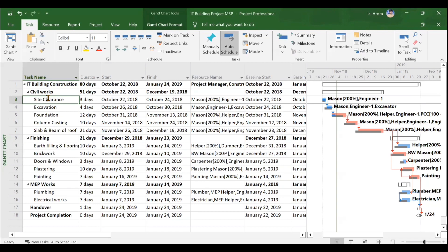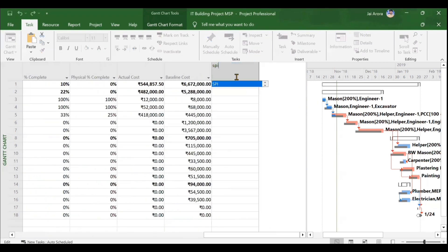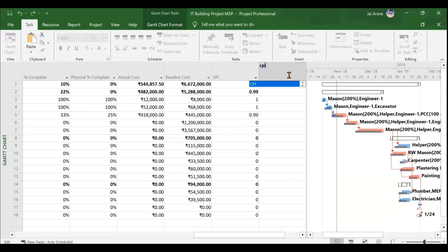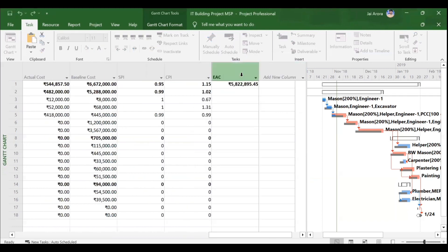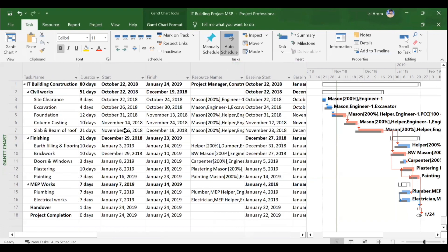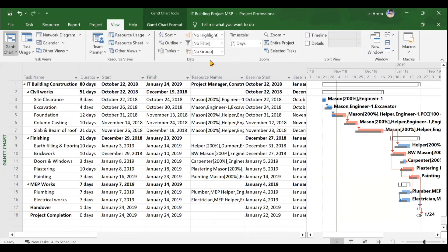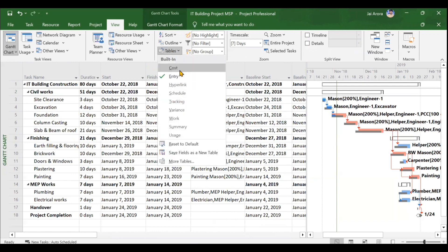Now we'll calculate and analyze EVM parameters in the Microsoft Project window. There are two methods: you can manually add EVM columns like SPI, CPI, and EAC to the main window, or use the simpler built-in earned value table. To access it, go to the View tab, click the Tables dropdown in the Data section, and select 'More Tables.'